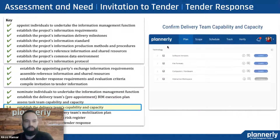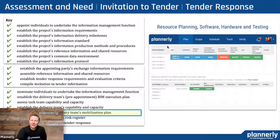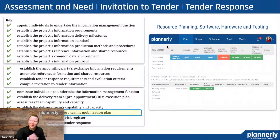Once we did that, we can also go into establishing the delivery team's capability and capacity. Whatever we learned in the previous step, we can start communicating that — what are the software packages that we are using, what kind of trainings did we already go through, and what are those trainings that are still maybe scheduled to take place. When can we get started with this project? Establishing the mobilization plan: testing the CDE before you start using it, performing hardware and software checks, and addressing what's missing from a training perspective so that we are ready to hit the ground running when the project really kicks off.